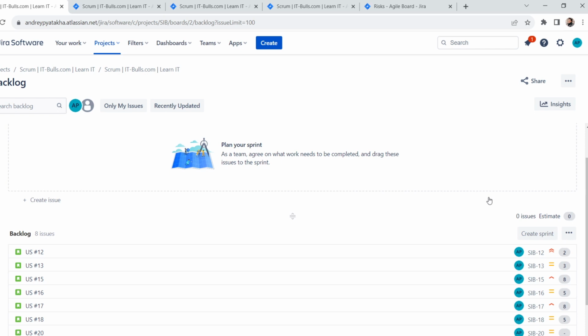So, here in the backlog you can also see that user stories have priorities. And when I plan a sprint, I want to take into consideration priorities and plan the user stories with the highest priorities and then with the lowest. You can see that there are 2 heavy user stories with high priority, 8 story points each. That means, unfortunately, both of them don't fit into the sprint if our capacity is 14 story points. And in this case, the remaining space in the sprint should be filled out by user stories with lower priorities. Does it sound logical to you?